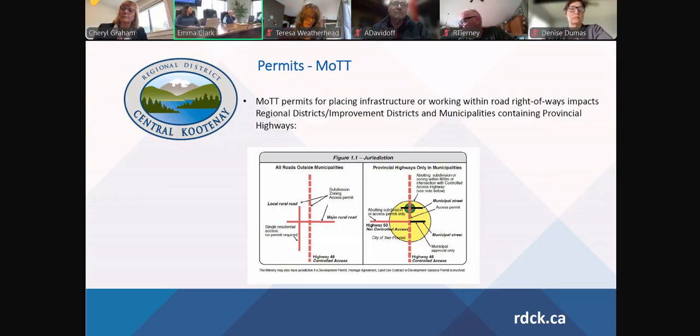As I mentioned, for a meter pit installation it's going to be topsoil, sod or grass seed, and make it look like it did before. No ongoing encumbrance, no settling around that meter pit. It should generally be an innocuous spot on the parcel.